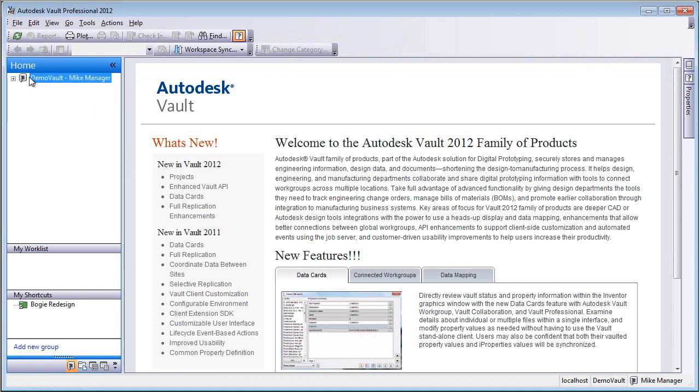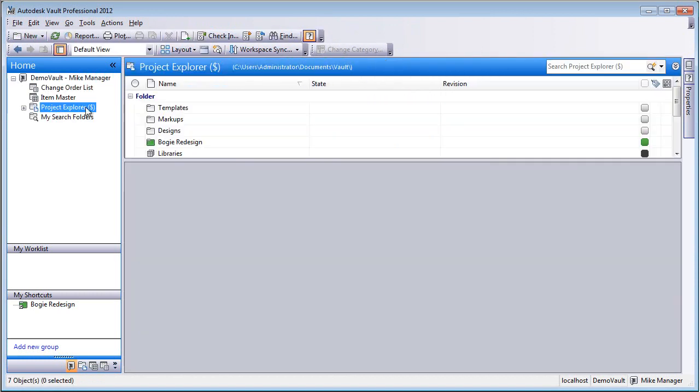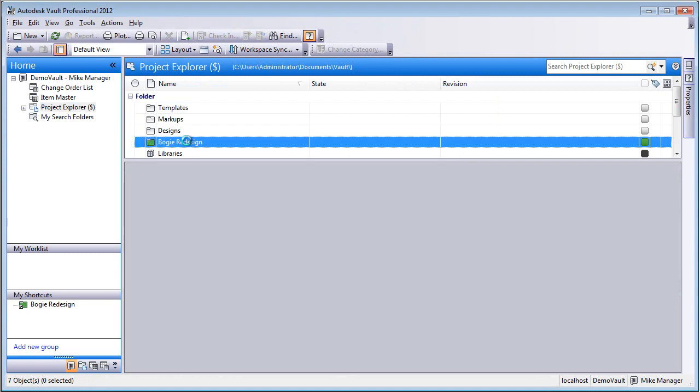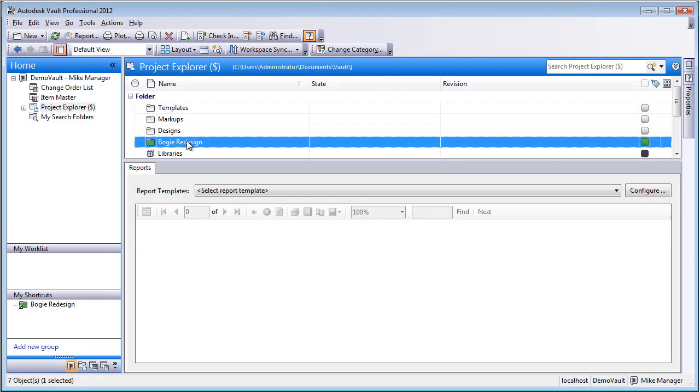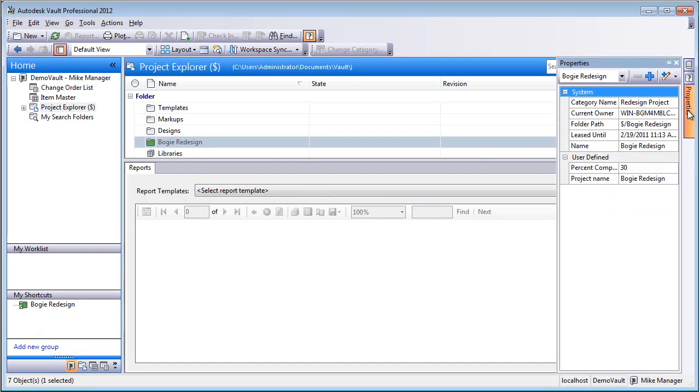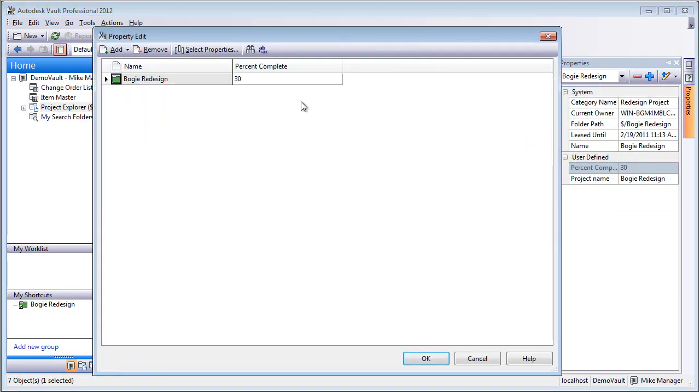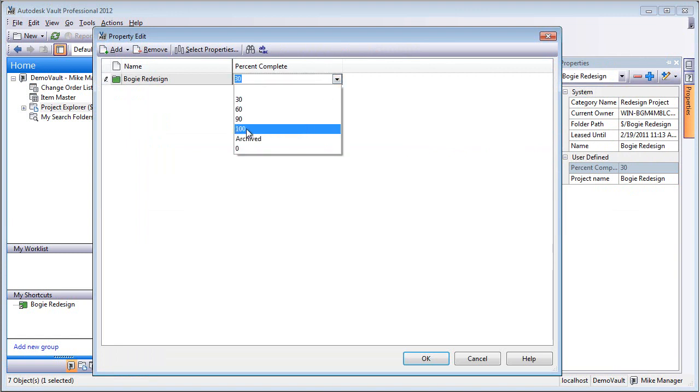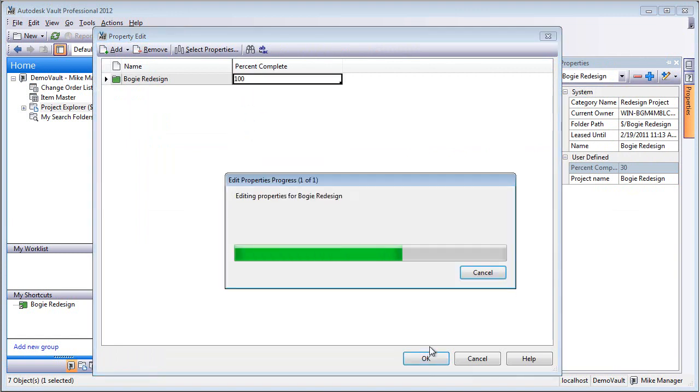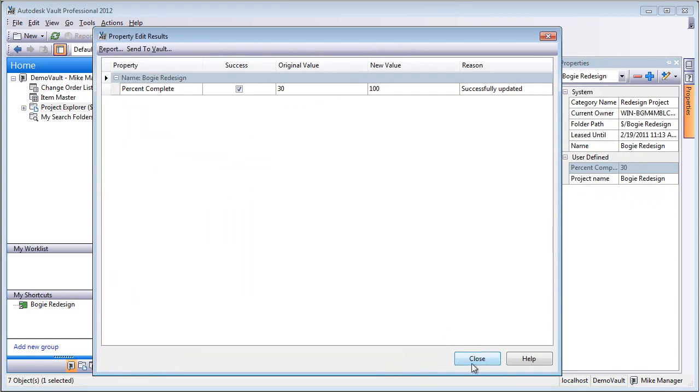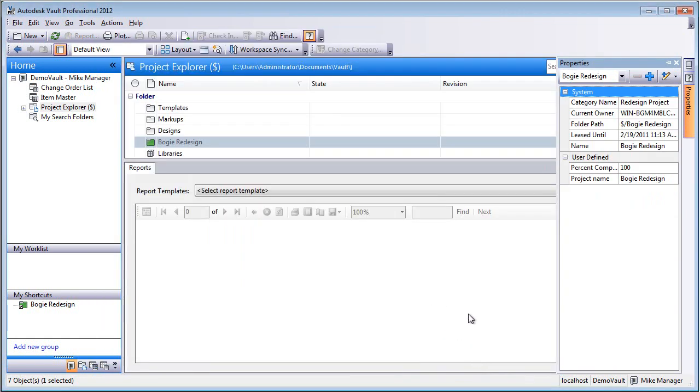And finally, this whole project of changing, identifying that from the 3D markup, the creation of the ECO and everything, this was what we would call a project. So now that the completion of the project, we're going to go in and take that project, edit the properties, and mark the percent complete to be 100% complete. You could also mark this to Archived. And now that that design is complete, we can take and move on to the next redesign. But if we ever go back to the bogey redesign, we have a link to all of the data that was part of that redesign project, from the markups to the files to the change order.